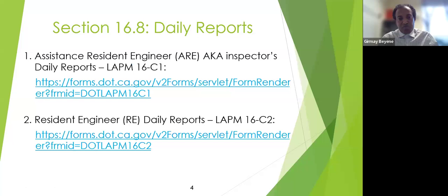So section 16.8 of the Local Assistance Procedures Manual covers daily reports. The current update, the 2024 update, is broken down into two. Basically, the Assistant Engineer Daily Reports, also called Inspector's Diaries, which is Exhibit LAPM 16C1. The link to the exhibit is here. And then we have Exhibit 16C2, which is the Resident Engineer Daily Reports.